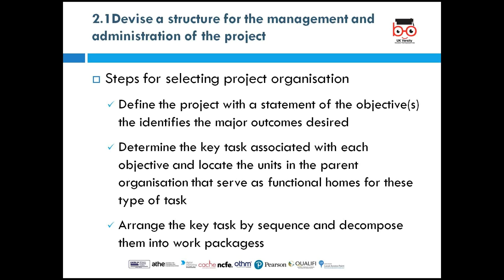So these are all different tasks involved that you can use to plan your project. So for a step for selecting the project organization, you need to determine all the tasks associated within the project. And then you arrange the key tasks by sequence and decompose them into work packages.